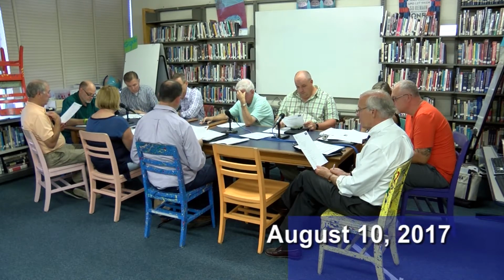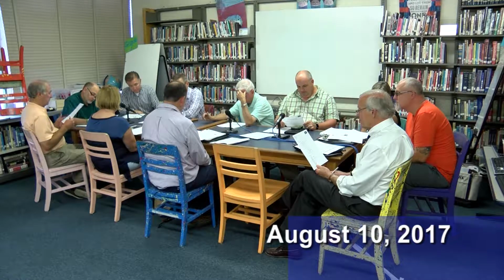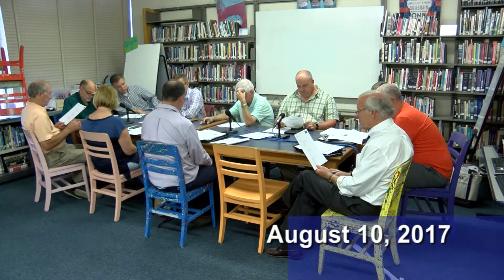So what's next? Our big milestone coming up is obviously the start of school. So over the next month, there'll be, again, the paving that's going to be going on this weekend. The new electrical transformer and feeders are going to be going in shortly. After the paving, the site contractor will start on sidewalks and curbing. The fire pump house is going to be taking shape. Propane tank installation is scheduled for the next few days. It's imminent.